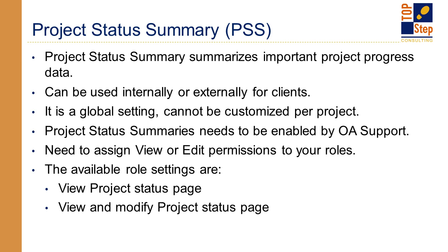It is a feature that needs to be enabled by support, and once it's enabled, you then need to assign view or edit permissions by role. The available role settings that you need to consider are View Project Status Page and View and Modify Project Status Page.